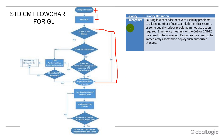On priority definition: emergency is defined as causing loss of services or severe usability problems to a large number of users, a mission-critical system, or a similarly serious problem requiring immediate action. Emergency meetings of the CAB or emergency committee may need to be convened, and resources may need to be immediately allocated to deploy authorized changes. We will be focusing majorly on emergency changes and maintenance changes during the first phase of the change management process.